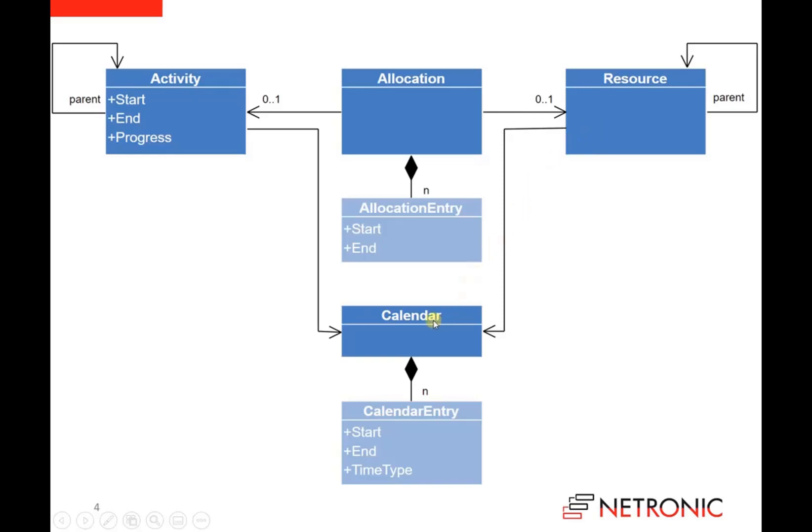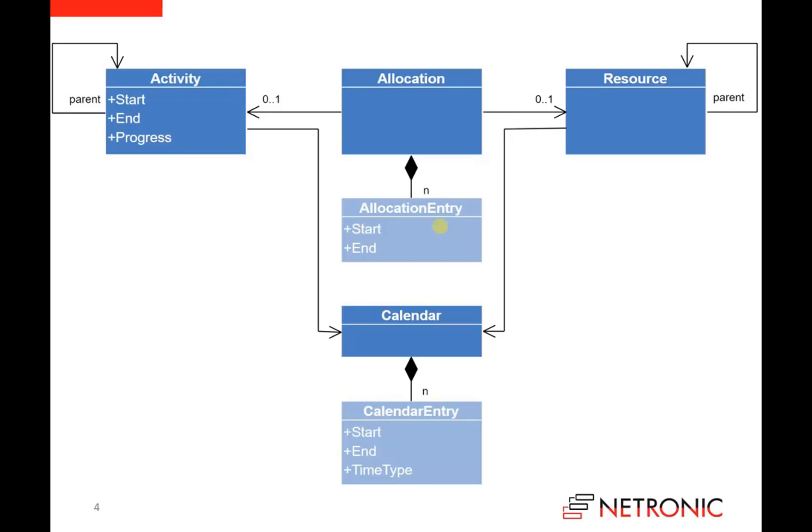Resources can have references to calendars, but also activities can have references to calendars. The reason for that is the following: for example, in project management, in the first step you design your activities, you specify the relationships between the activities, but you do not assign resources. But nevertheless, it may be that you are interested, for example, in the base calendar that is valid for the entire company. So this is the reason why we can reference calendars from activities.